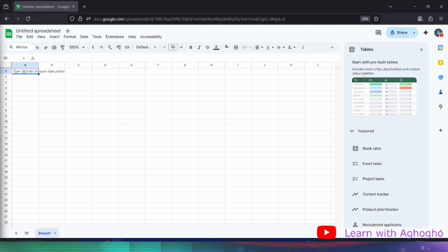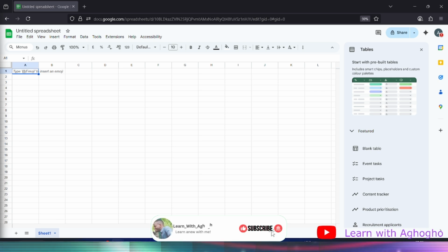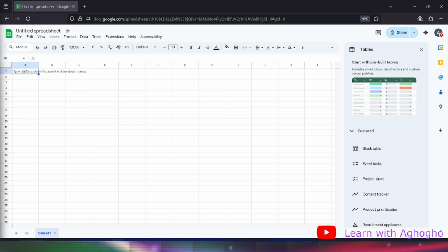So this is then converted into a quantitative value by equating this qualitative value, in terms of low, medium, or high, as the case may be, to 1, 3, and 5. So let's quickly jump on that so that we will appreciate what I am talking about.